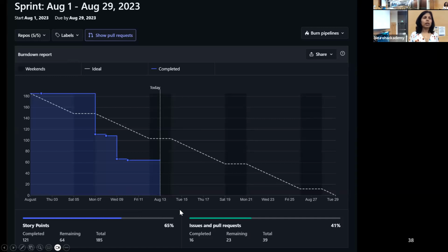My way of measuring that things are getting done is that we have monthly milestones in our statement of work, and I check in to see that those monthly milestones are being met. You can see there's a lot that happens on, I think, a Monday, because possibly a lot of code got checked in and a lot of issues got closed. So some of this is working. And again, it drives accountability and visibility.